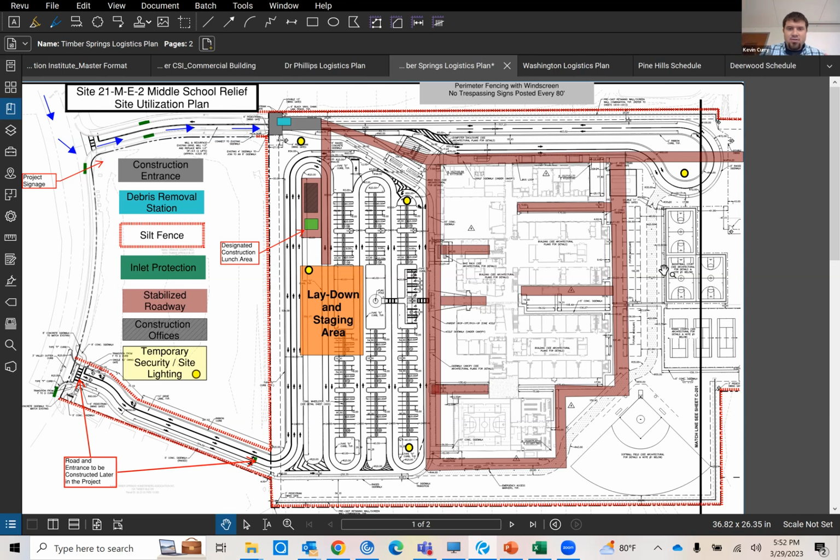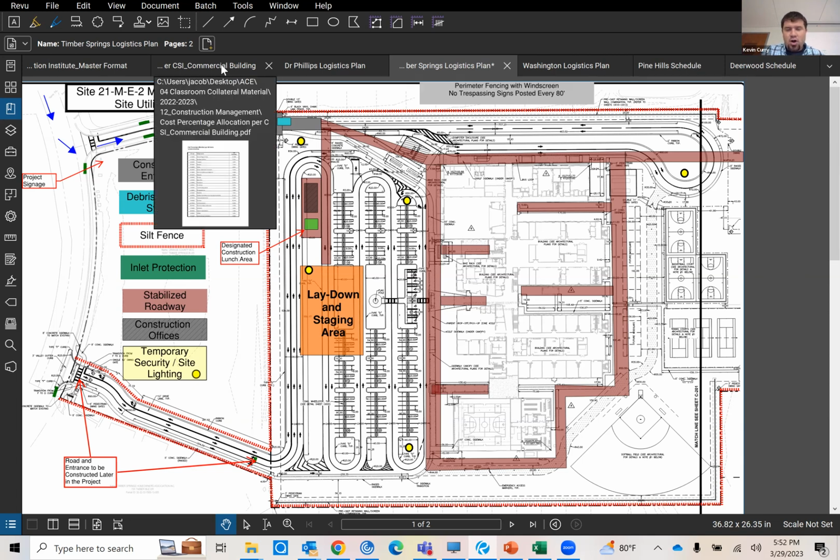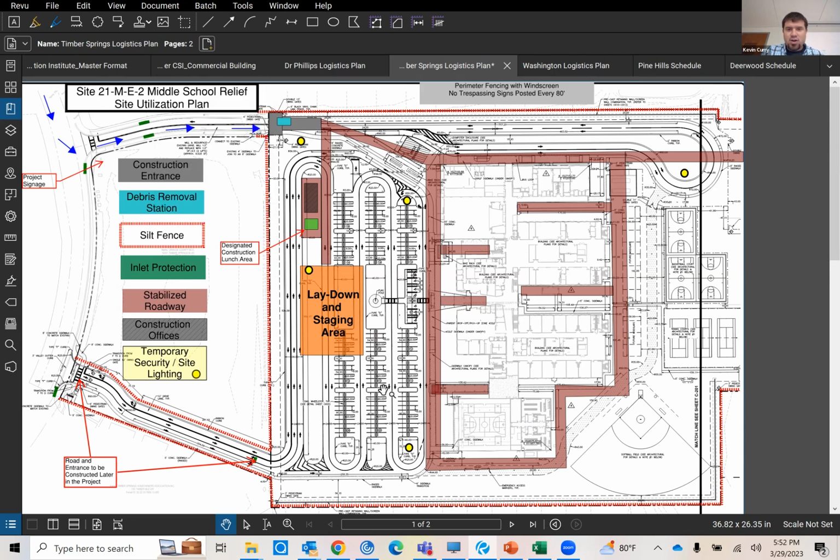But almost everyone can understand some colored up drawings. And even if you put a date in there, start and finish, and you show on this floor plan what you need, you can communicate that to the ownership group. If you're on a renovation of a high school, hey, how long are we going to be using this one haul route to come through for parents to drop off and pick up?